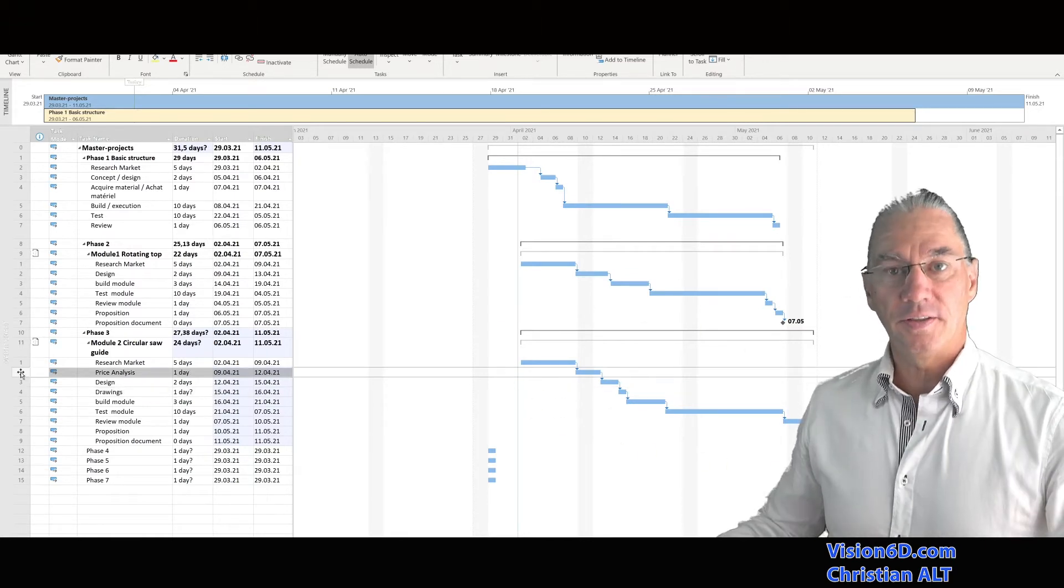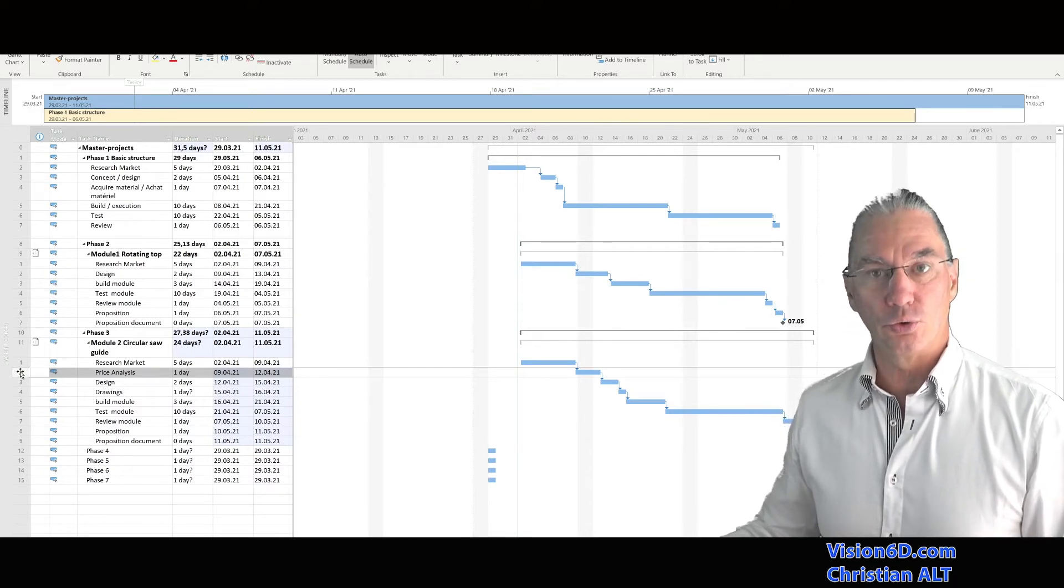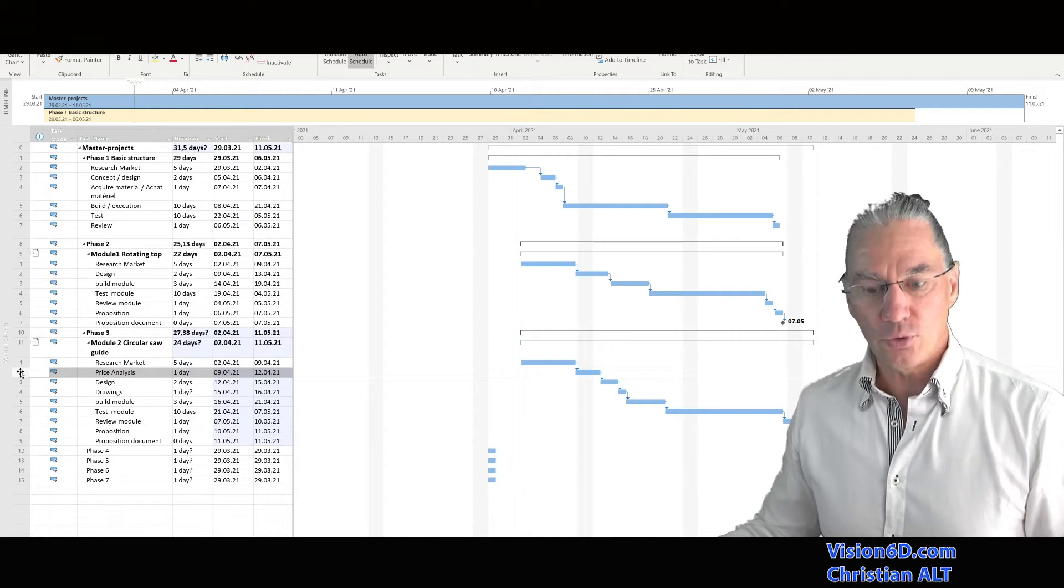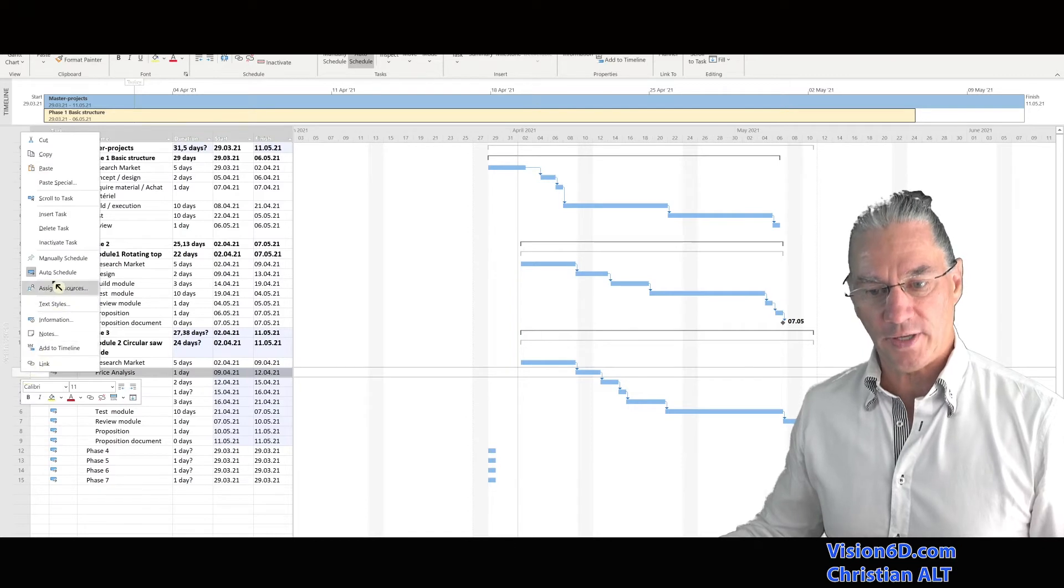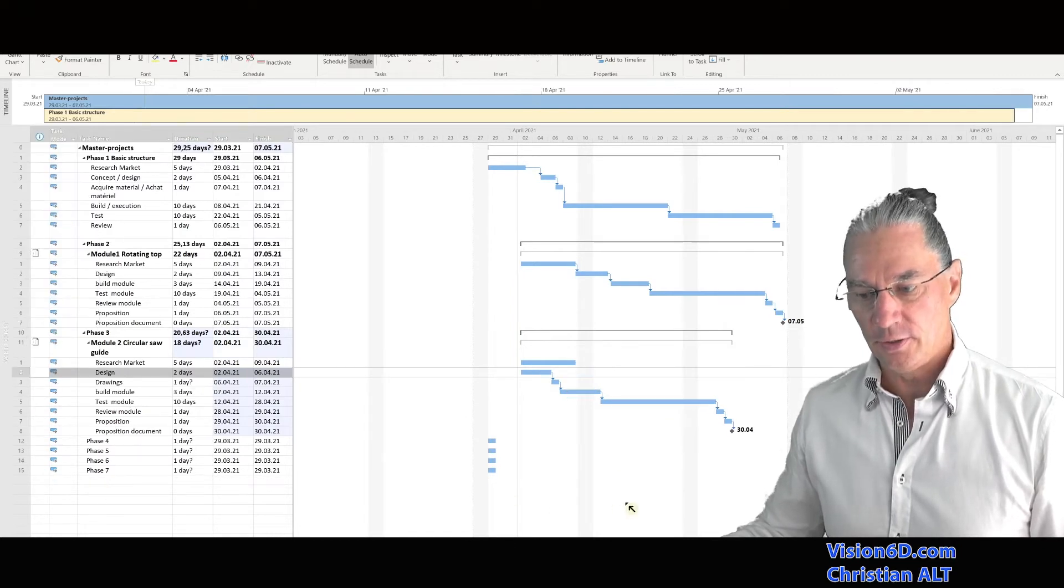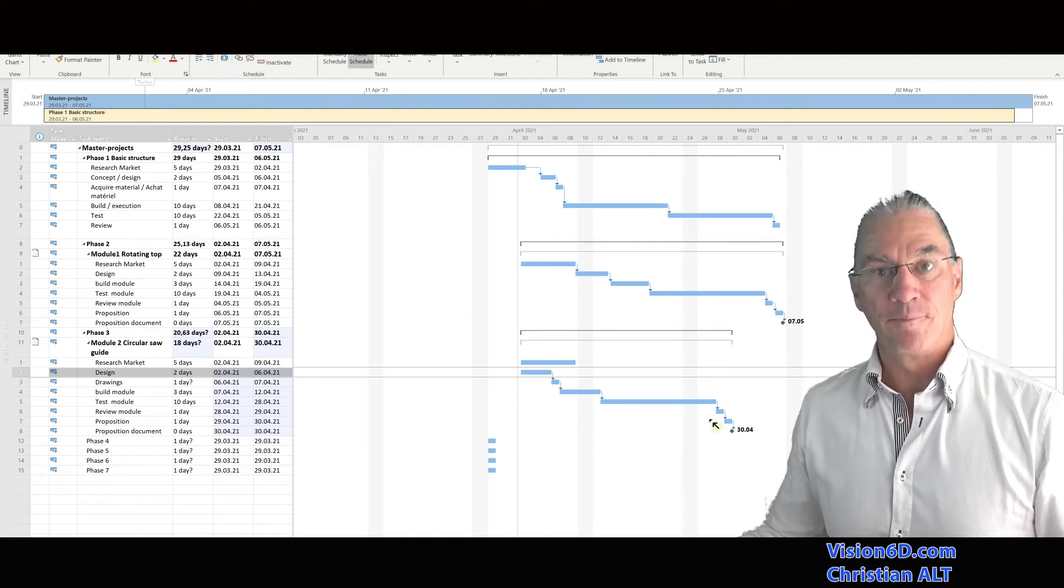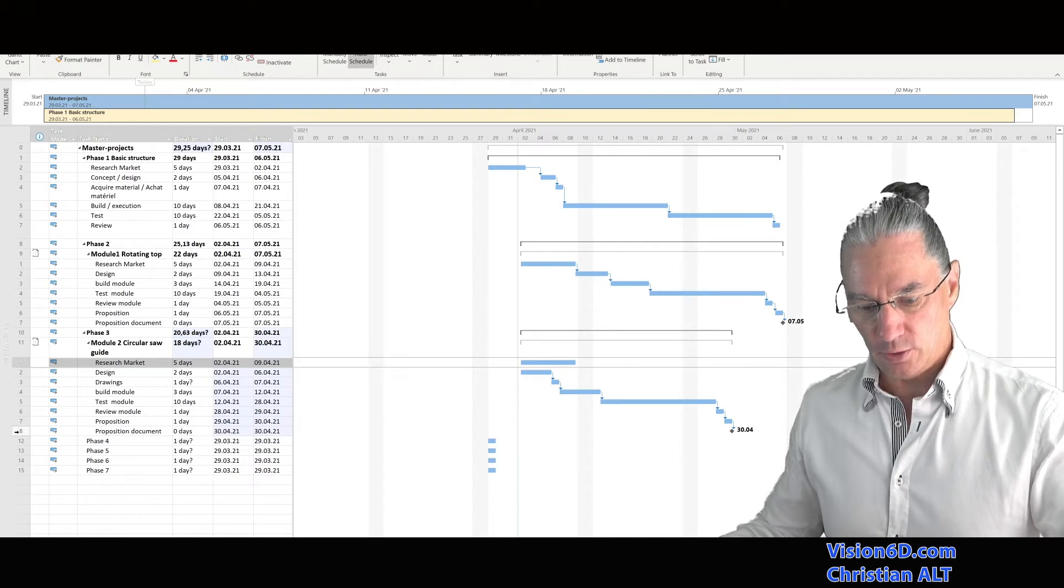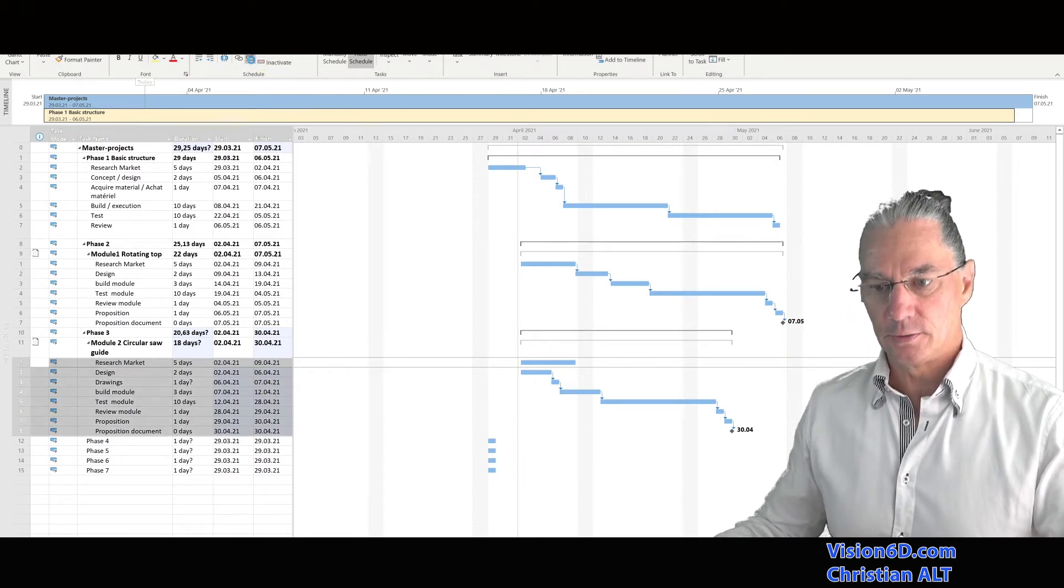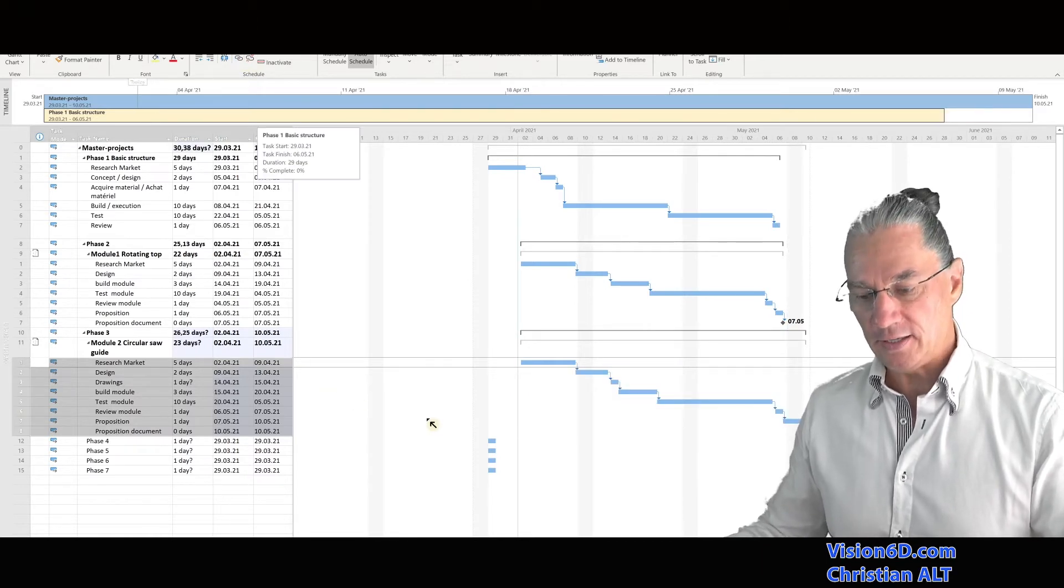In the end, the price analysis is something we didn't do and we didn't need. So I'm going now to delete the task directly into the master. And we are going to see what happens. So I delete the task here. And you see that it restructured my schedule. And again, I'm going to take all the tasks, unlink them, and then relink them to see what happened.